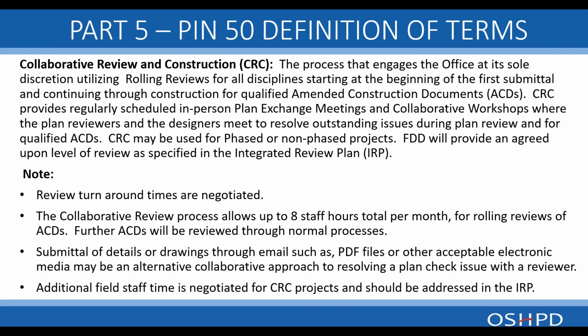Submittal of details or drawings through email, such as PDFs or other electronic media, may be an alternate to collaborative approach. Additional field staff time is negotiated for CRC projects and should be addressed in the IRP. That also is a big plus for projects once they've started construction.